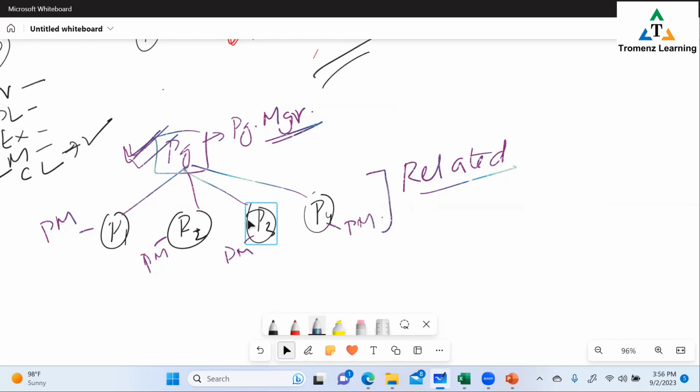Okay, so then last thing, now between program manager. What does a program manager do? Program manager will not manage the projects. For that, we have project managers. Program manager would do things at a high level, things such as commissioning each of the projects. Program manager decides when each project should start and what would be the timelines of these projects. What would be the budget of these projects is dictated by the program manager.